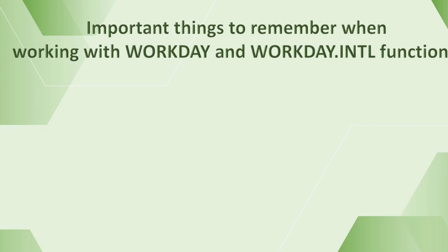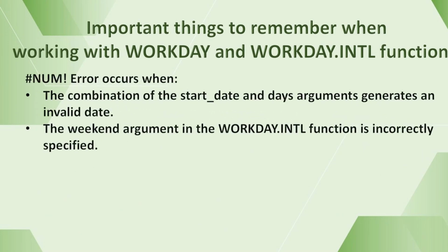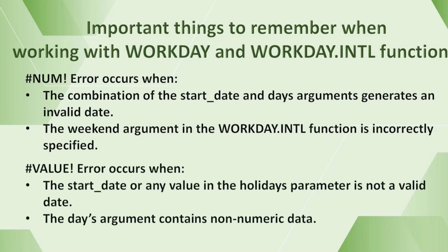Important things to remember when you are working with Workday functions. Numerical error occurs when the combination of the start date and days arguments generates an invalid date, or when the weekend argument in the WORKDAY.INTL function is incorrectly specified. The value error occurs when the start date or any value in the holidays parameter is not a valid date, or when the days argument contains non-numeric data.